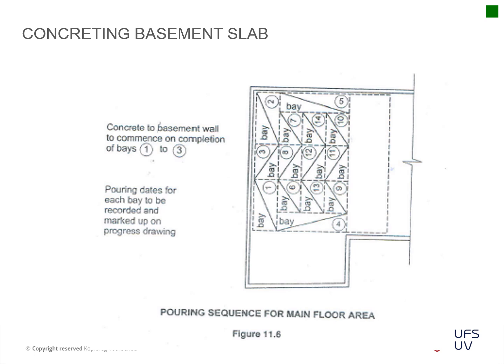Okay, then they went into more detail on actual construction bays. They've got certain blocks that they do their pours in, because you can't pour a continuous block. Remember that site visit where we had the construction joints and the saw cut joints for the expansion and movement of your concrete. That's basically why you have to plan boxing in your concrete pours within the specified parameters from the contract or engineer. Okay.